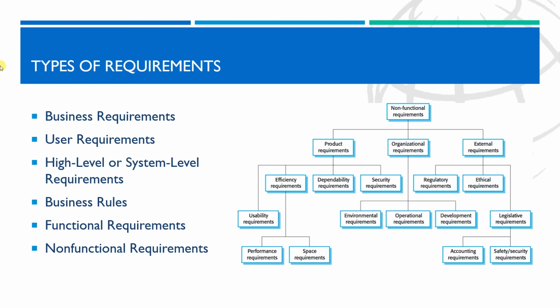The business rules must be captured explicitly by the person analyzing the business, and baselined during requirements analysis. Focusing on business rules as the core functional requirements speeds requirements analysis and promotes validation and verification.